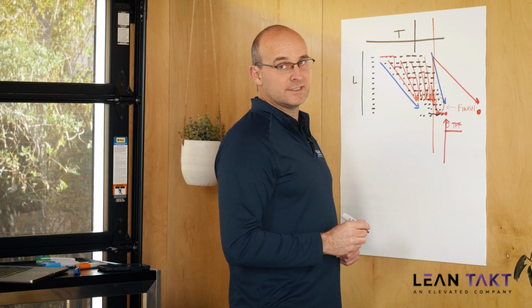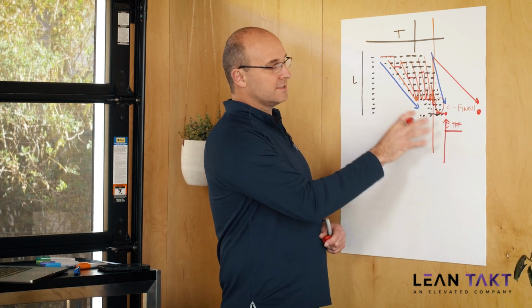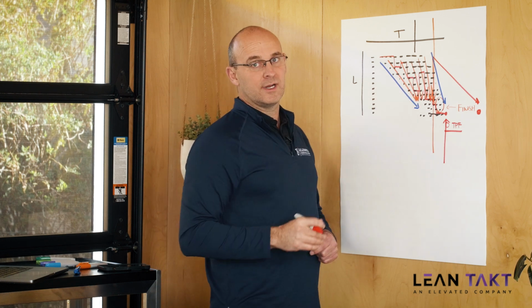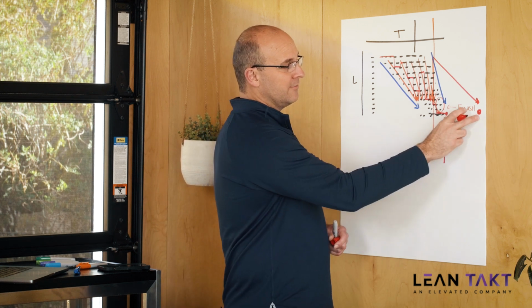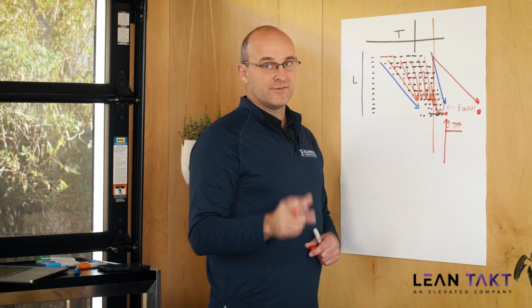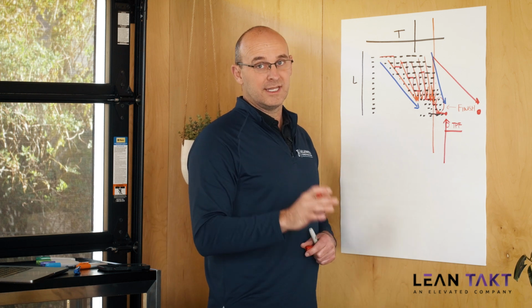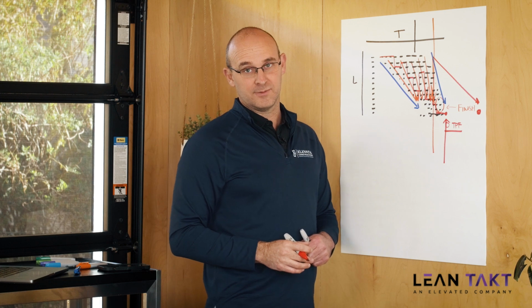And I want you to know this isn't just my opinion. There was a project of the same size and magnitude that got into this trouble and did not do what I'm about to tell you, and they got into a massive problem. They finished 4.5 months late. Half of the team quit. They didn't get any work with that owner again, and they were minus $2.3 million from a profit standpoint.